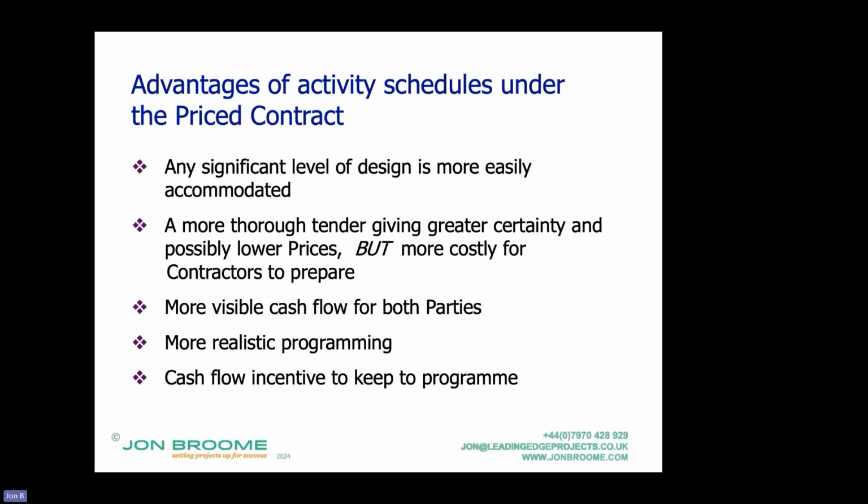And the advantage of that is that if there's any misrepresentation, and I'm not saying fraudulent misrepresentation, innocent or negligent misrepresentation, it isn't from the client if they get the quantities wrong, because it's not the client who's prepared it. It's the consultants who've exercised reasonable skill and care. So they do a deal with the consultants to prepare it. Contractors get it from them. They get some feedback on the quality of their scope document.